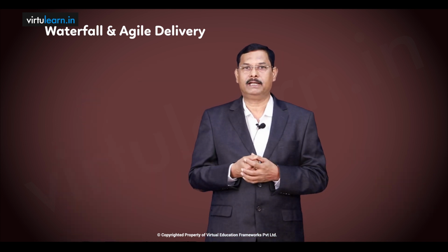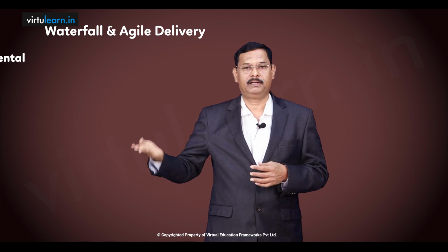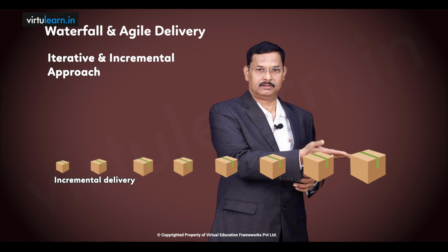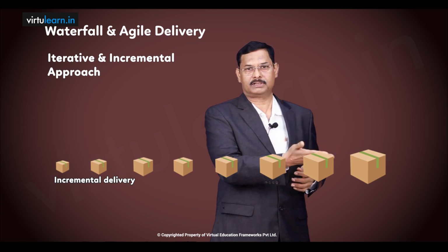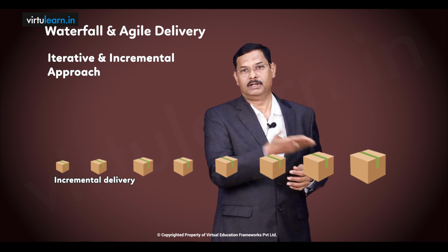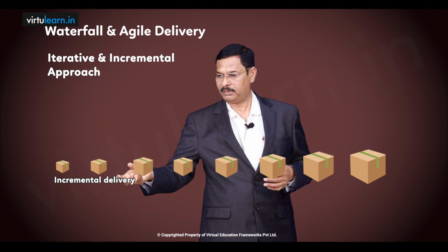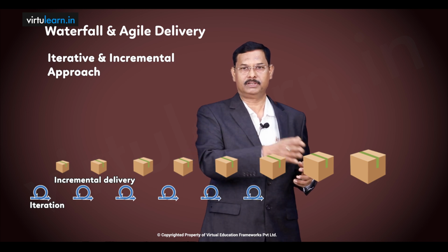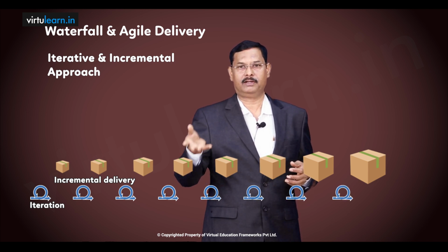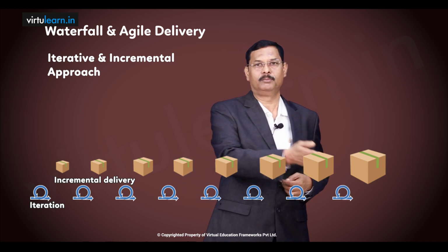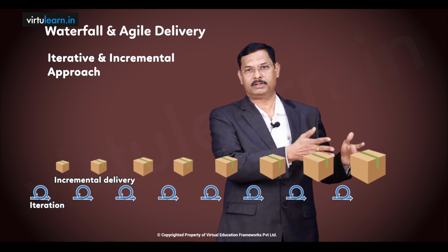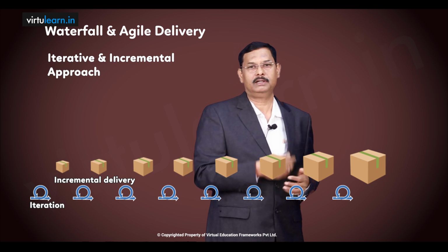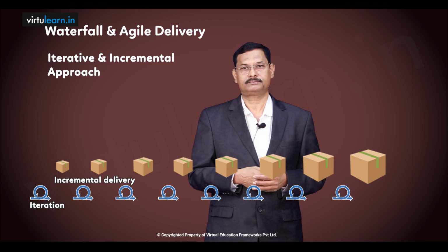Now if you look at the agile way of delivering, it is an iterative and incremental approach. You see the software product assets in terms of the business. In the beginning, we are making a small increment of the product. As we are passing through the increments, we are adding more and more features into the product, and you see the same delivery that happens otherwise in waterfall development at the end happens incrementally here in agile delivery.